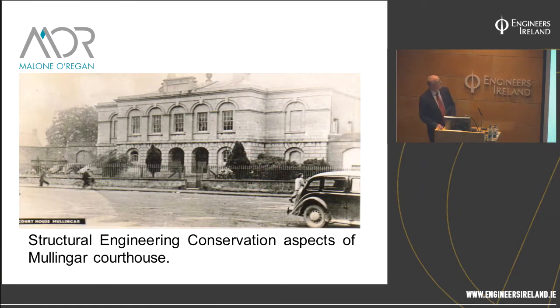Perhaps I should have said earlier, one of the contract requirements on this is that the PPP company maintains the buildings for 25 years, and that at handback stage, in 25 years' time, the buildings have to have a residual life of 50 years on all major structural elements. So that means that our design life from now is 75 years, and that's beyond what we would normally be designing to using Eurocodes or British Standards. And that has a knock-on effect in most areas.